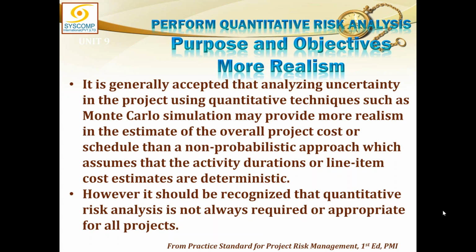That means, okay, what is the estimated time? 1 plus 3 into 4 plus 10 divided by 6. 3.8 or something. Yeah, I'm sorry, the mics were off. You say again? 1 plus 3 into 4 divided by 6, right? No, 3 into 4 plus 10. The optimist plus 4 times the most likely plus pessimist also. Yes, sir. The answer is 3.8. 3.8. 3.83, okay, to be exact.